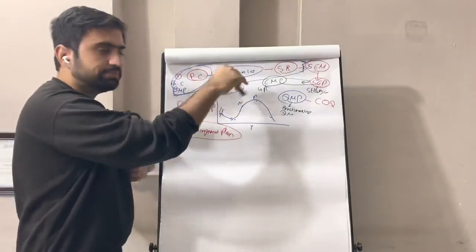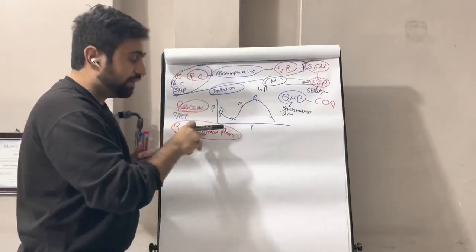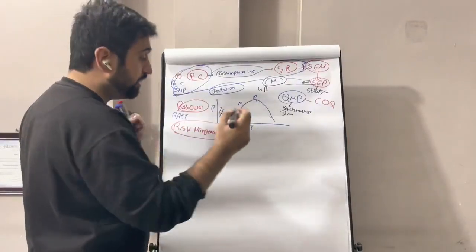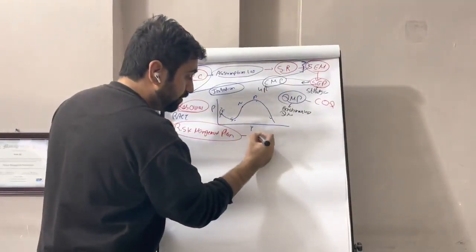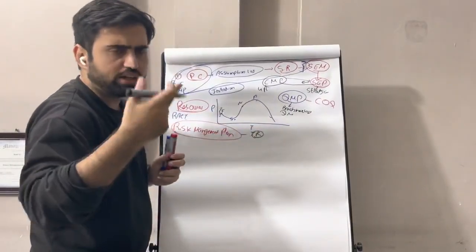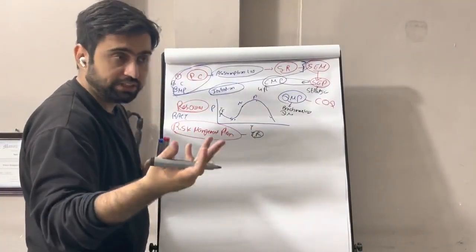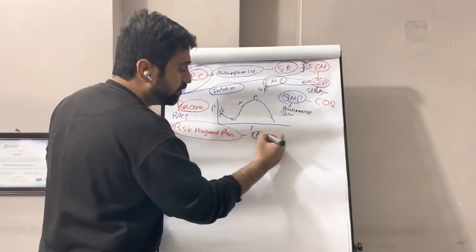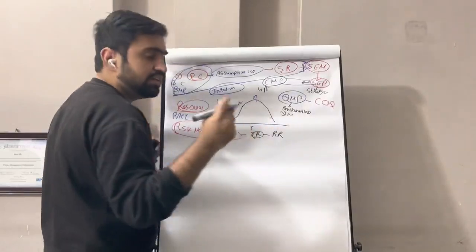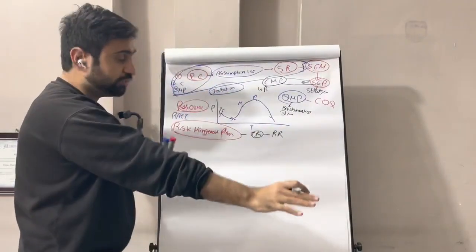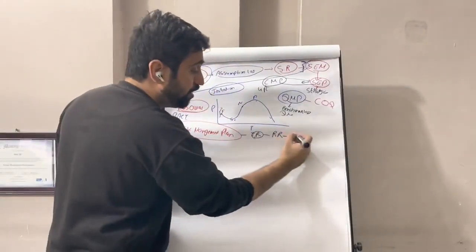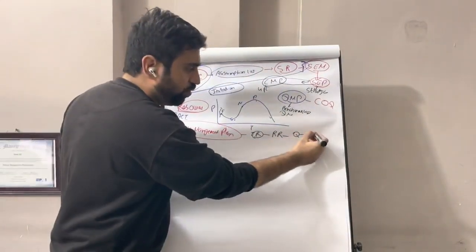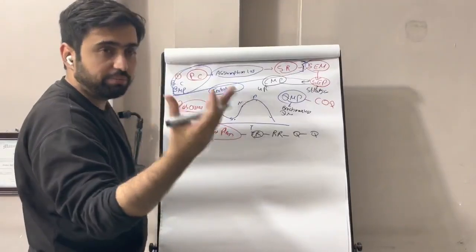Now, the other knowledge areas have only one process, but here in risk management, once the risk management plan is made, we identify the risk. We start identifying the risks through all the tools and techniques: SWOT, assumption analysis, PESTLE analysis. Once we identify the risks, we put all of them in the risk register with a potential owner and potential response. Then we rank them qualitatively by probability and impact, low, medium, high. Then if needed, quantitatively, giving numbers to those risks.